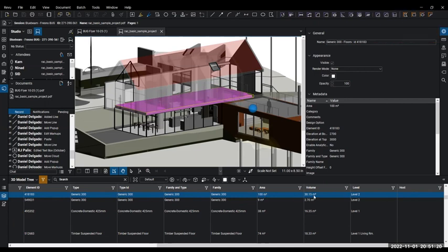This will also tell your volume as well. So for those that are civil engineering, you'd want to see your cubic yard pours for concrete. So this here saves you time, I think, if you have that 3D model, because then you don't have to run your calculations, right?